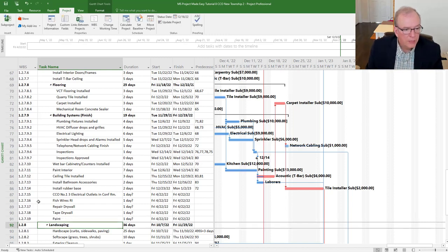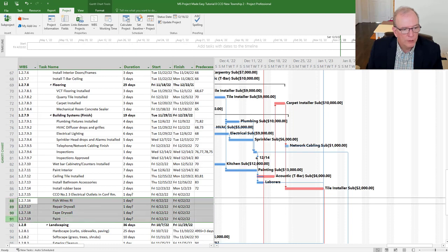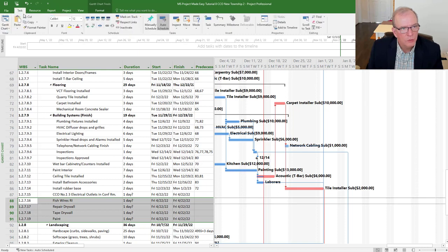All right, so I put in these 5 simple activities, and I'm going to highlight 4 of them. This one is going to be a title. So we're creating a summary task as part of a work breakdown structure for this. I'm going to click on the Task tab to do that. And in earlier videos, I've described this, so if you're not familiar with it, you can check them out. I'm going to click the indent icon here. So I'm under the Task tab. I'm going to click the indent icon, and now it creates this heading.